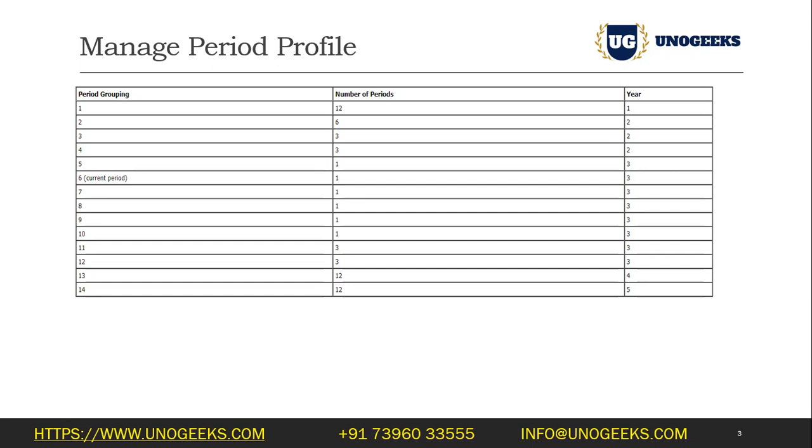Okay, let's go back to E-Business Suite. In E-Business Suite, we had only three options. One is event, one is cost, and there was one more I forgot. Work. So these were three. Now you are saying that with the event, you will be creating the invoice. What happens when you create the invoice from an event? You create an event and you simply give the amount there. The event amount is the final amount for the invoice creation.